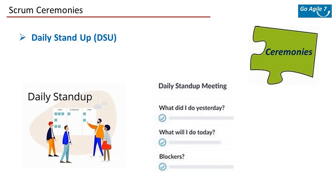Daily stand-ups should not run for 30–40 minutes or an hour — that's not effective. Once you get used to Scrum ways, you should not need more than 15 minutes. If there are pointed discussions about an impediment, have an offline meeting after the daily stand-up rather than engaging all members. Teams should have the self-discipline to join these meetings on time. There's a wrong notion that the Scrum Master has to start the DSU every day — whether the Scrum Master is there or not, the team should be responsible enough to start it at the right time.